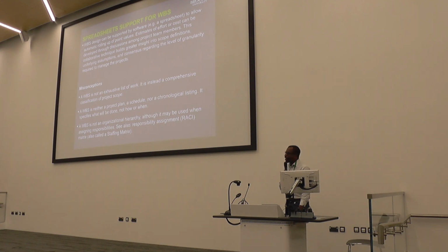And then the work breakdown structure is also not an organizational hierarchy, right? An organogram is very different. Within an organization, that tells you the responsibilities, or the design responsibility matrix of who needs to do what. The work breakdown structure, all it's doing here is helping you systematically break the work into chunks you are able to manage.